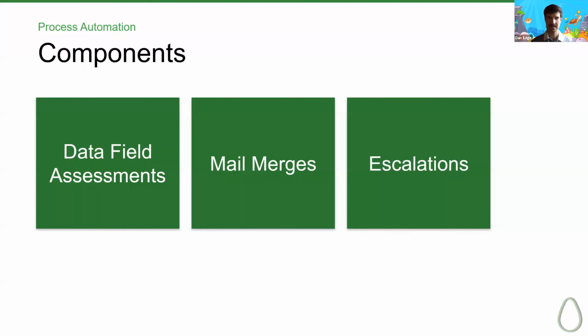Process escalations allow us to notify or even add actors when certain criteria is met on a process instance. Here's an example. We can add an escalation rule to re-notify the process actor if our pay app instance hasn't moved in 3 days. And that's the system's way of saying, hey buddy, we gotta get this contractor paid within 30 days. Let's keep it moving over here.